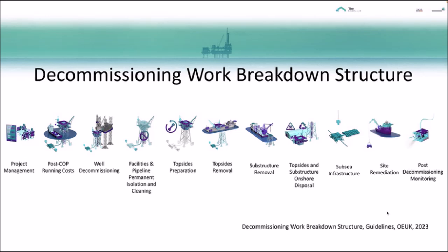We then have Phases 10 and 11, where we undertake a post-decommissioning survey and set up a monitoring regime for any structures or pipelines left in place. There are regulatory, liability, financial, technical and environmental considerations to all of this.